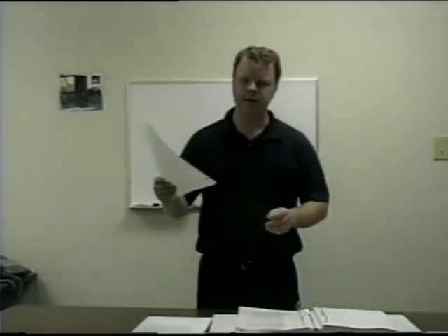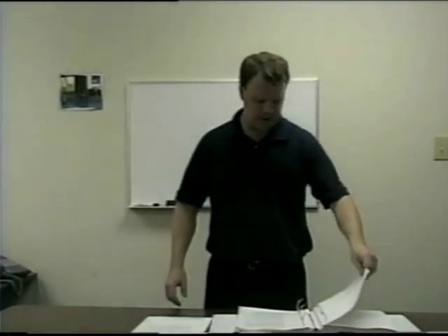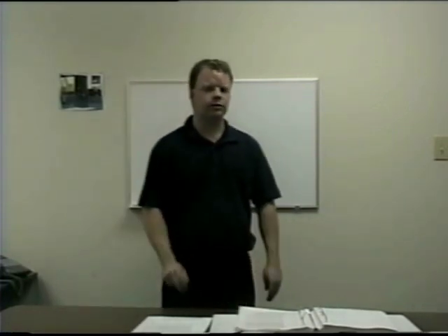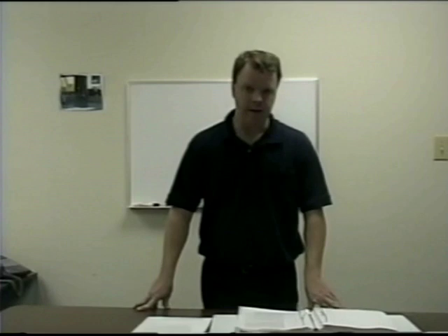A lot of times that means going to the submittal and finding out how that needs to be done. If the submittal doesn't say, and you're not sure, call the subcontractor, ask them where he bought his materials from. Call the material supplier, ask them if they've got a representative that can come out and take a look at your job. We're going to make sure that they do it right.